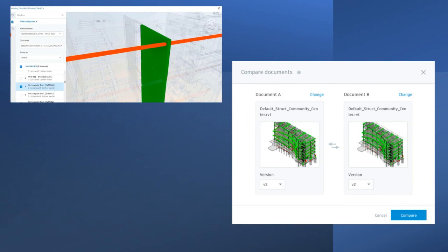Thank you. Amazing. The second question is, can we see clashes in Revit and Navisworks from Autodesk Construction Cloud? So yes, there is an add-in that you can install into Revit and Navisworks. And if there is an issue that is created in Autodesk Construction Cloud, you can actually push that to Revit and Navisworks. And the other way around as well, you can create an issue in Navis or create an issue in Revit and push it to ACC where it can be tracked and every single team member can track that issue and see everything.